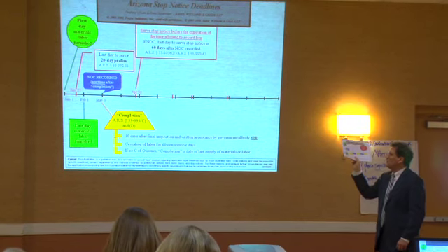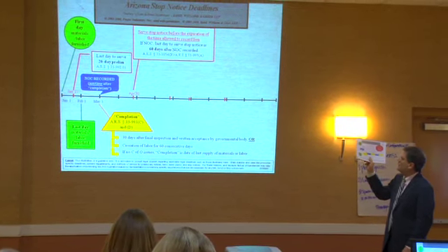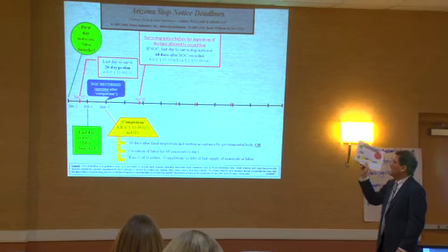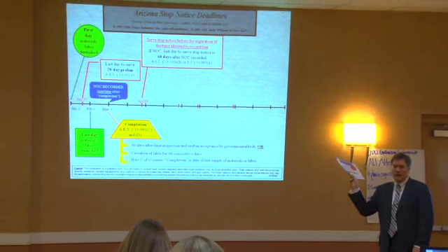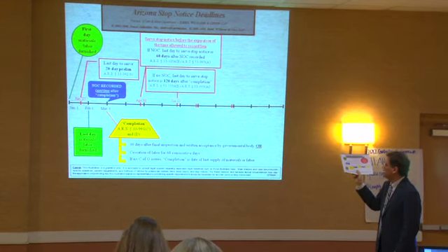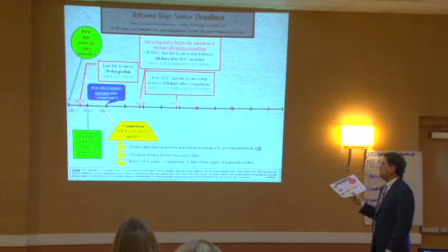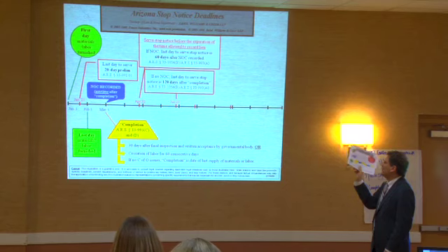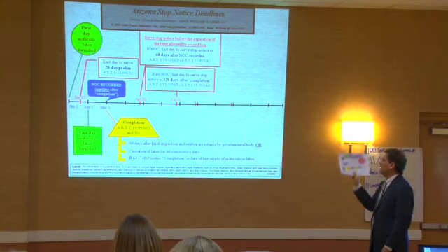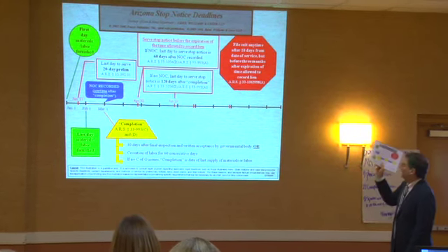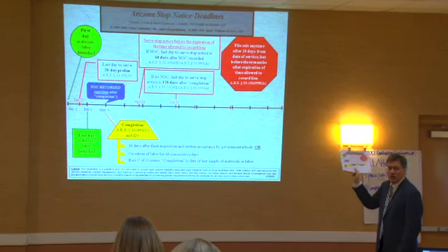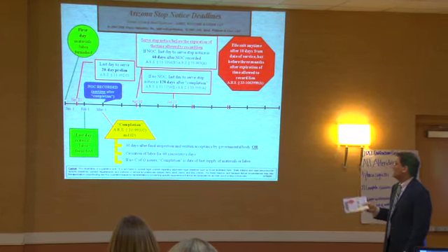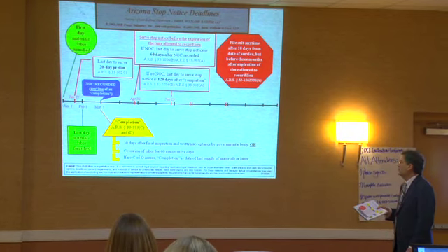So if there was a notice of completion recorded, the last date to serve a stop notice is 60 days after the NOC was recorded. In this hypothetical, our timeline is running exactly like what you just saw in the lien claim timeline. If there was no notice of completion recorded, the last day to serve the stop notice is 120 days after completion. Again, if there was no NOC recorded, the last day to serve the stop notice is 120 days after completion. When do you sue?